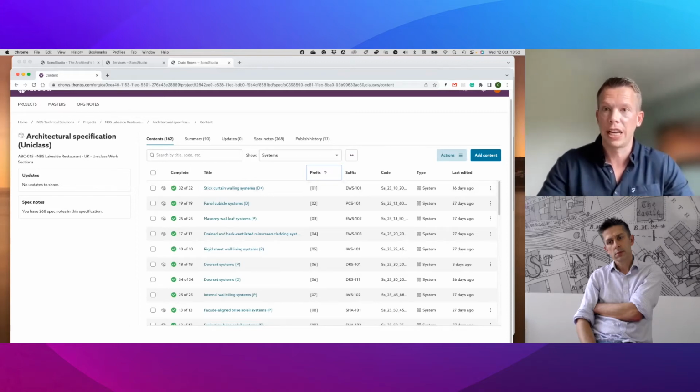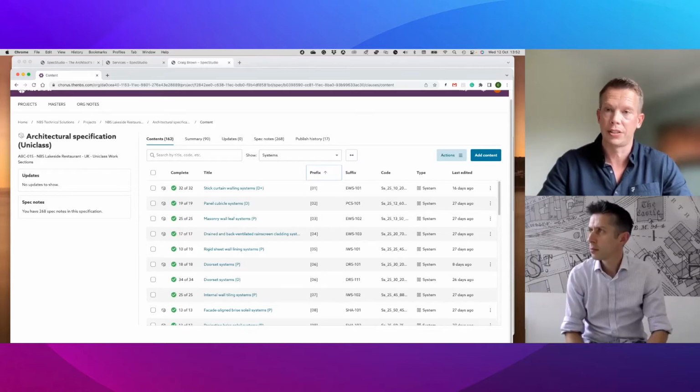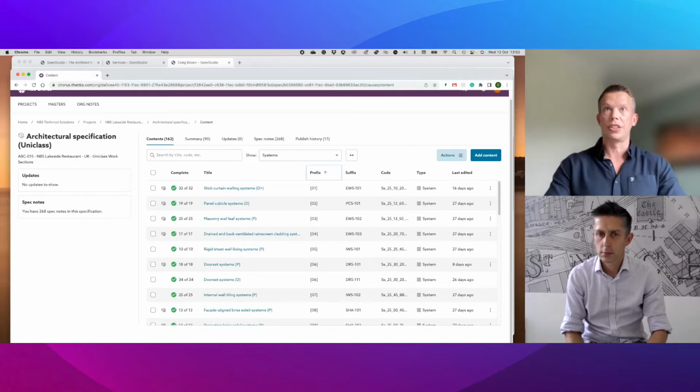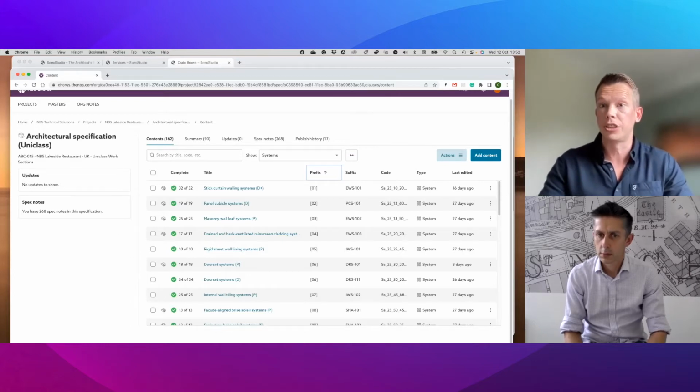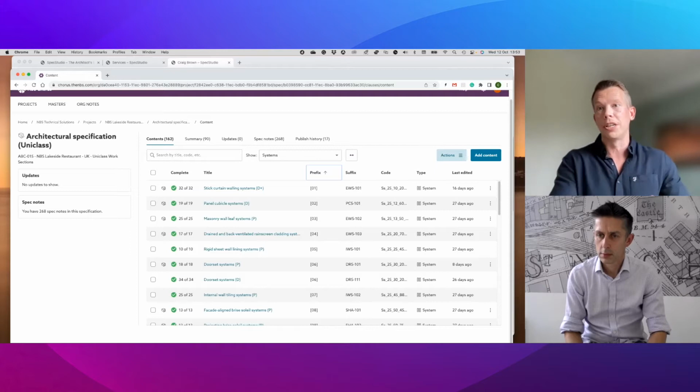So it's a case of tailoring it down, reviewing the information, depending on whether it's descriptive or whether it is prescriptive. Prescriptive is where it's complete instructive information used to manufacture and construct the system produced by the design team. So that's generally proprietary systems. Descriptive is where the design team describes the design intent only, and it then allows the specialist subcontractor to complete the detailed design of the system. These are more performance-based specifications. So it's very crucial to understand the design responsibility before you even start the specifications, because not everything will be prescriptive, not everything will be descriptive.